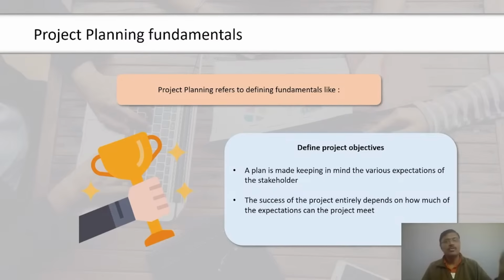The funding limit reconciliation technique is used to ensure that cost on a project is budgeted or spent as per the availability of the fund. For example, if a project can get funding of only $50,000 a month, the project budget should be planned accordingly. The output of this process is the cost baseline. This is an authorized project budget over a period. This is used to measure, monitor, and control the overall cost performance of the project.